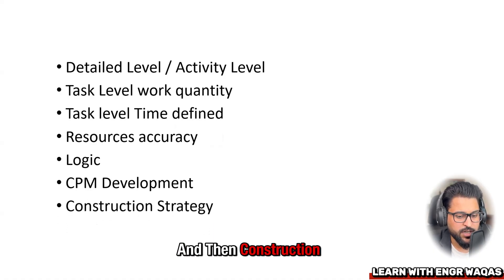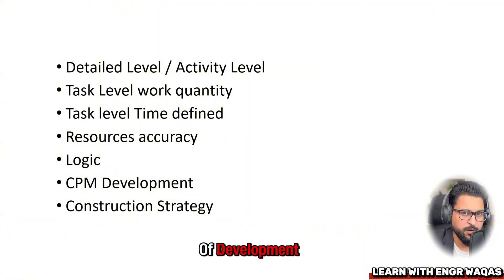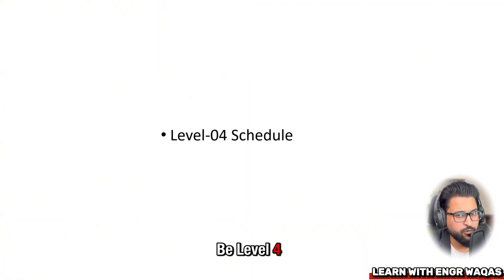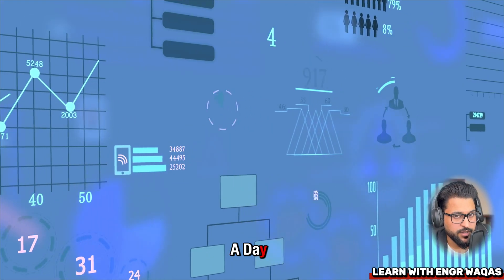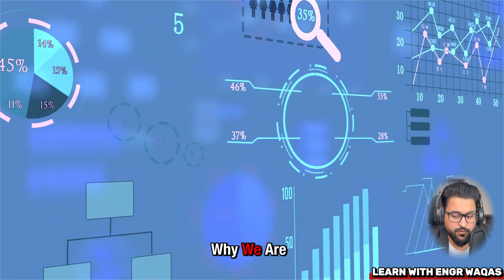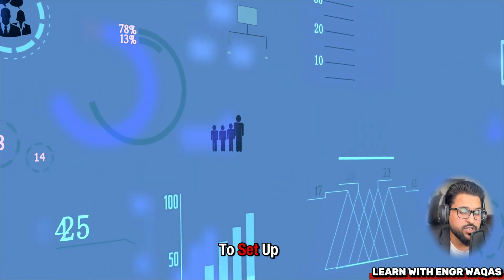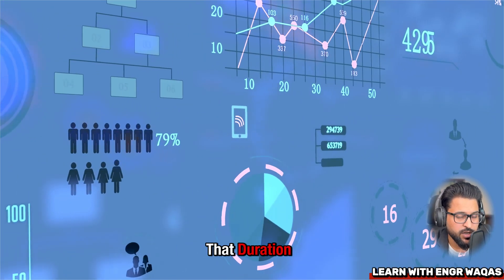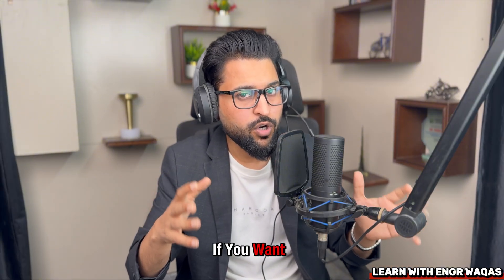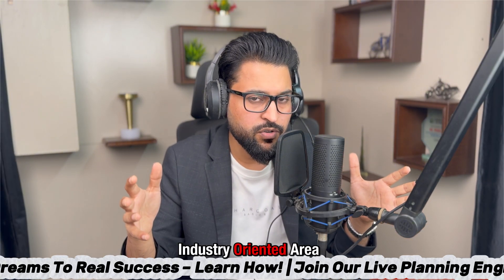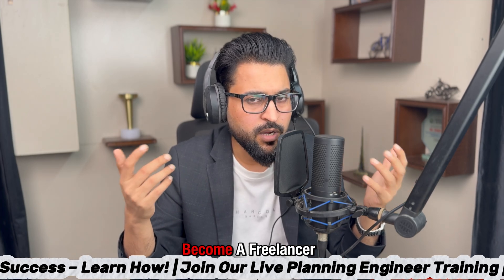Level 3 schedule is detailed at activity level: task-level work quantities are defined, time is defined, resource accuracy is established, logic is set, and CPM — Critical Path Method — is developed. Construction strategy is built on the basis of the critical path. Level 4 schedule involves resource assignment — for example, if you have 10 helpers you cannot plan work for 15 helpers per day, so resource limits justify duration decisions.